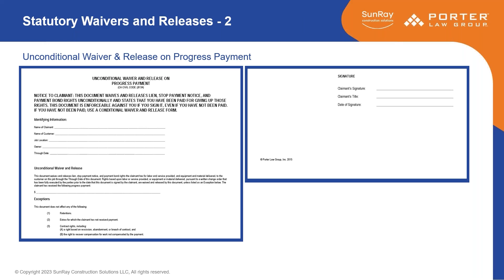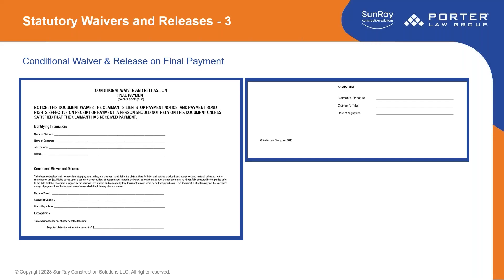When you get all the way to the end of the job, you get into the 'Conditional Waiver and Release on Final Payment.' Because the job is done, you're going to be getting your final payment, and this one is conditional — meaning you're going to get a check or have a check which was sent to you but has not yet cleared the bank. You fill out the information as before: your name, the name of the customer, the job location, who the owner is, then the release language, then the maker of the check, the amount of the check, and who the check is payable to. This should include all your retention.